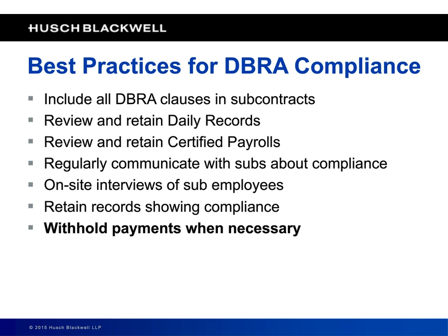The first person is your job site superintendent, because he or she is the person that knows who's there working every day. And the second person is somebody working in that job site trailer who has, if it's not their only responsibility, a clear responsibility for making sure certified payrolls are submitted and that they are accurate and correct and current.